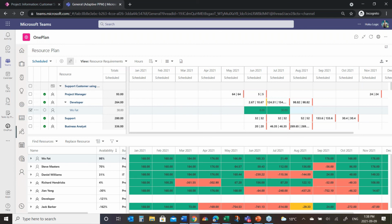Wanted to highlight that because this is where that data goes from when you create the resource plan in the project to the resource managers to look at and say, all right, how are we going to fulfill on those upcoming requests? And then as things evolve and things change, how are we going to continually adjust because something got delayed or something required more time? What is the rolling impact? And then as we fulfill future requirements, we're managing against capacity by capturing all the information, again, regardless of which tool you're using to execute the project at the other end.